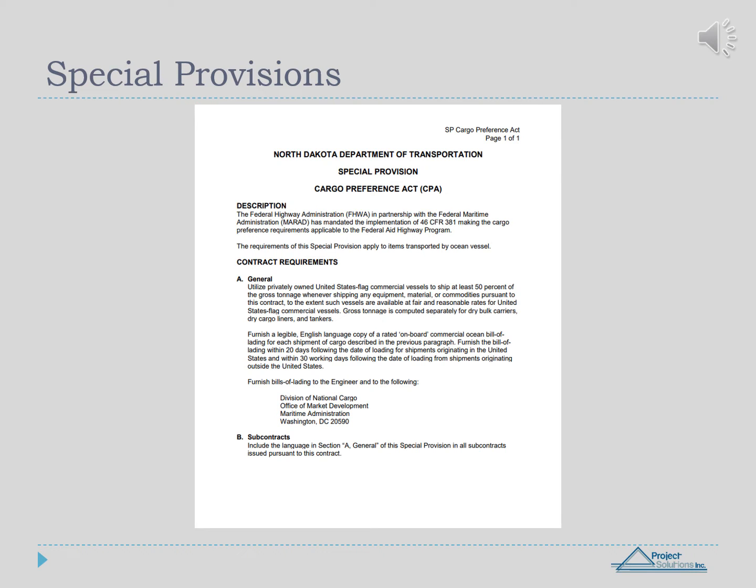In the RFP, you will find the special provisions associated with the project. Make sure to check special provisions, as the provisions may impact your cost to perform the scope of work identified in this RFP. Keep in mind, the special provisions are not the same on every project, but may be found on other projects.